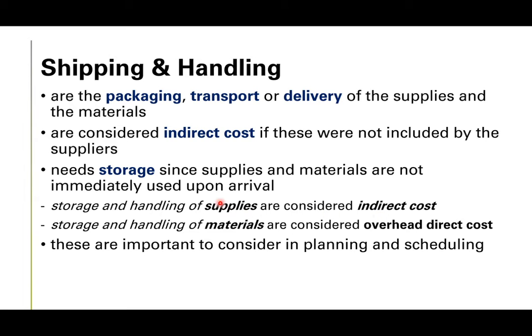So you see already, supplies are those that are not part of the project, while storage and handling of materials, which are part of the project, are considered overhead direct cost. But most of the time, the storage fee for materials is already included in the pricing of the materials.